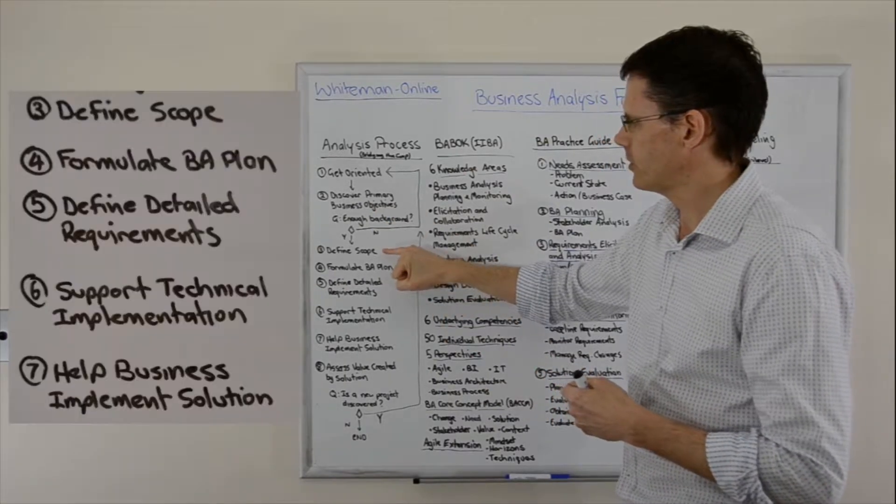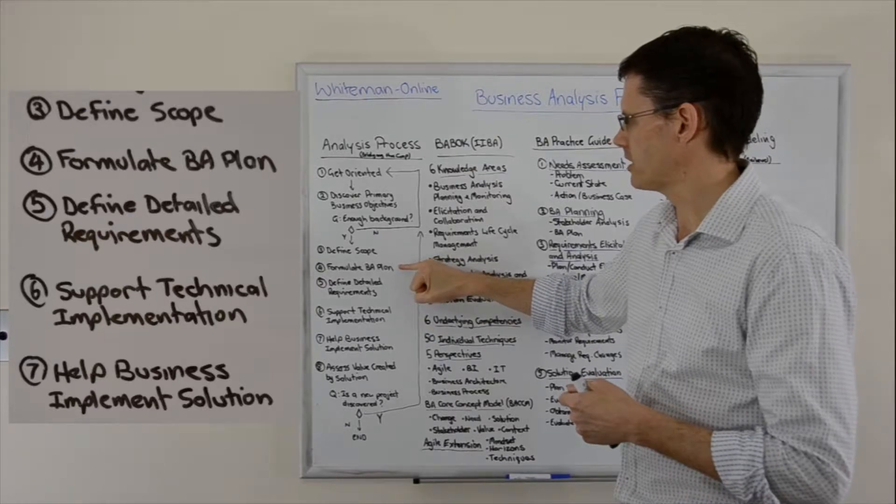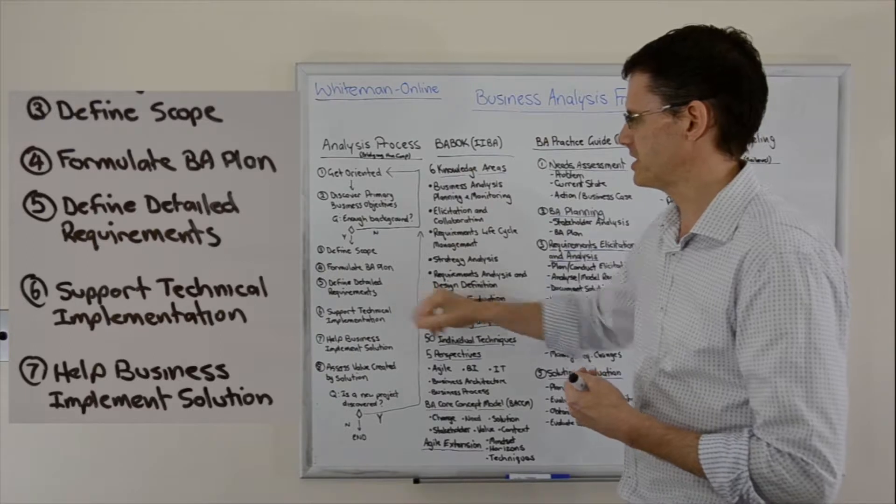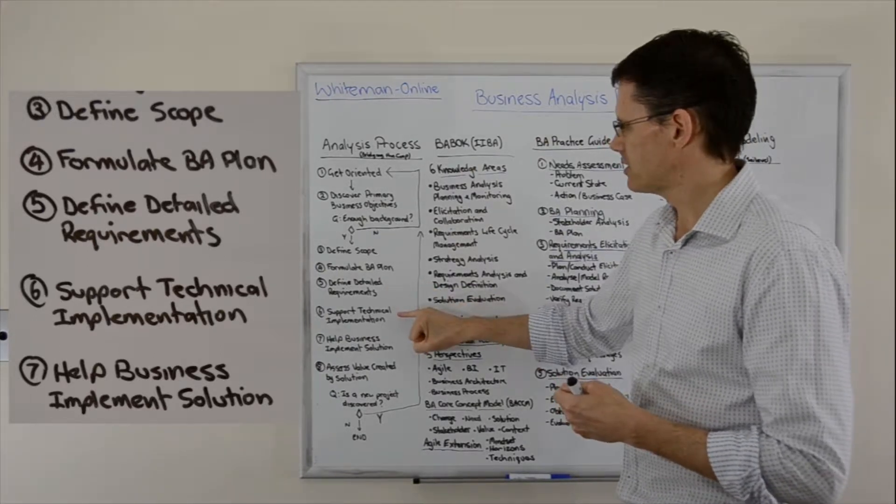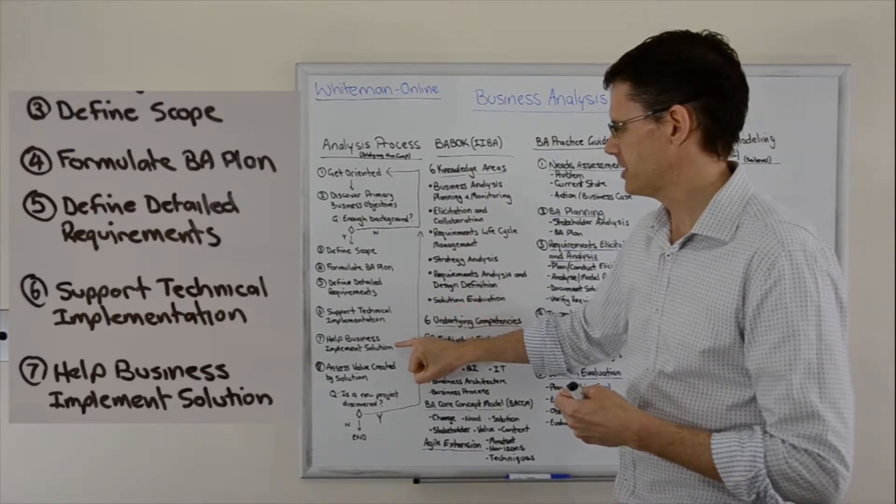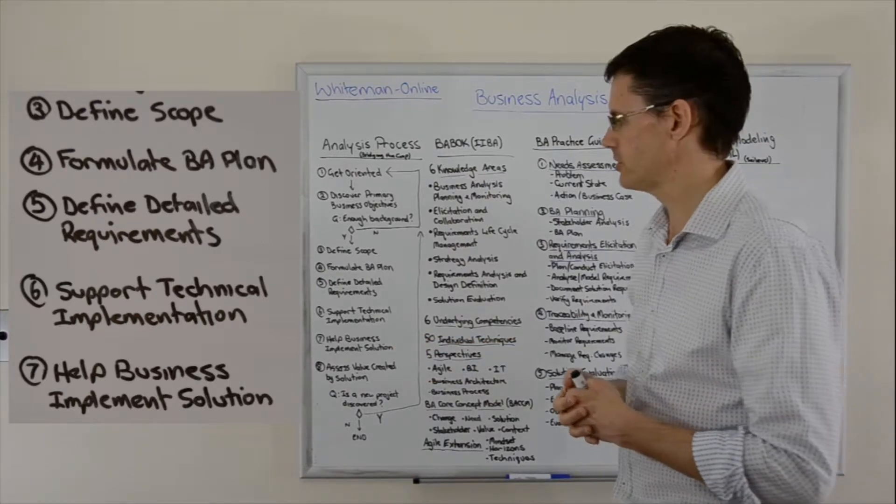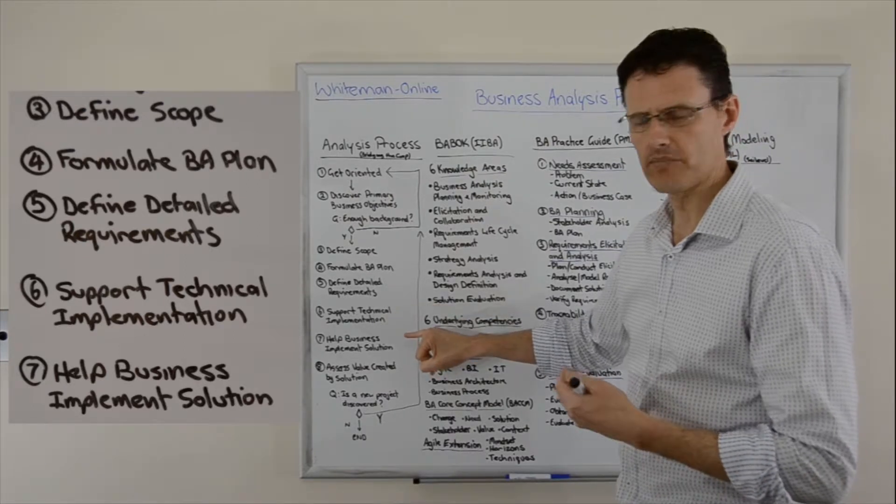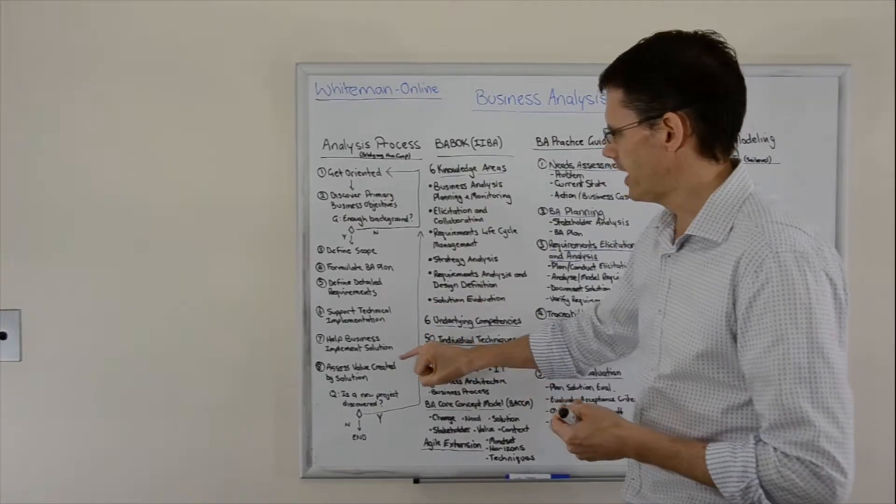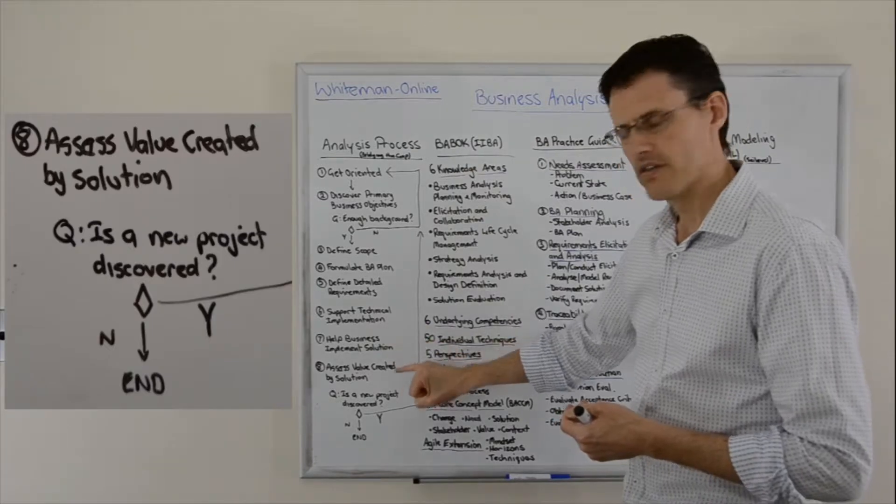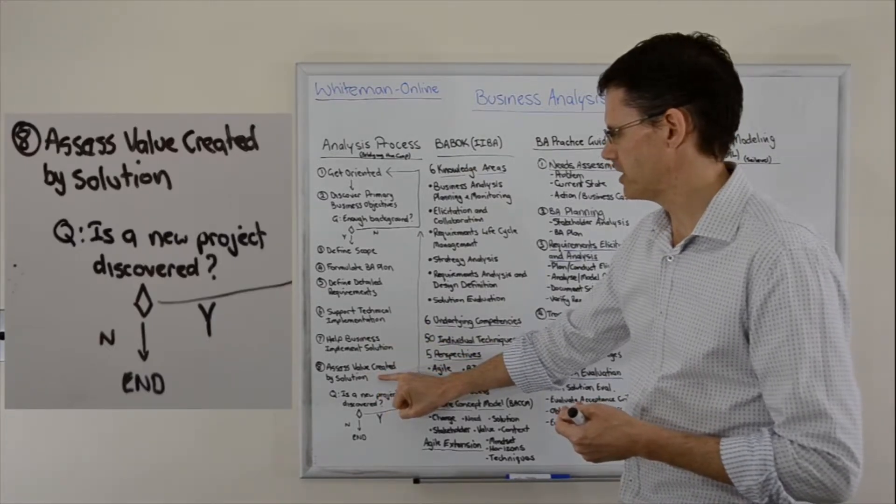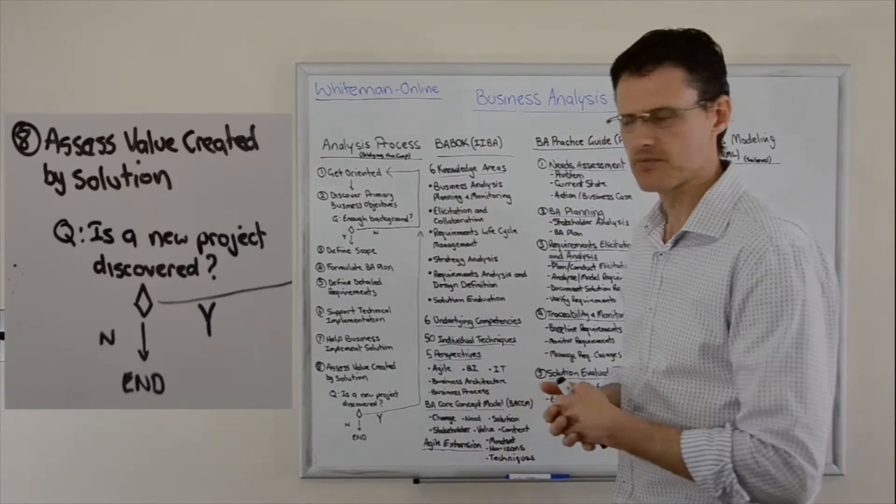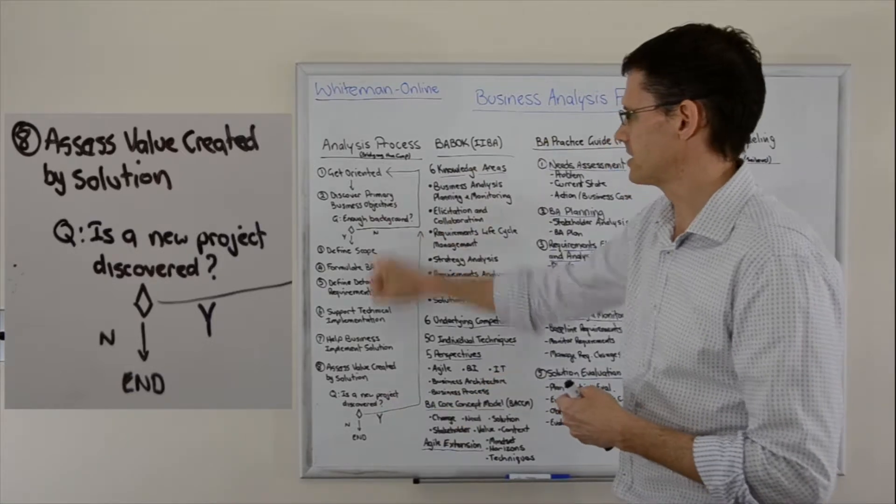They'll then move through defining a scope for the project and formulating a business analysis plan. They'll execute that plan and define detailed requirements. The analyst then supports the technical implementation, helping the business implement the solution. They don't do the technical development or implementation, but they have an assisting role. After it's implemented, they assess the value created by the solution. During projects, you'll discover additional projects, and then the cycle starts again.